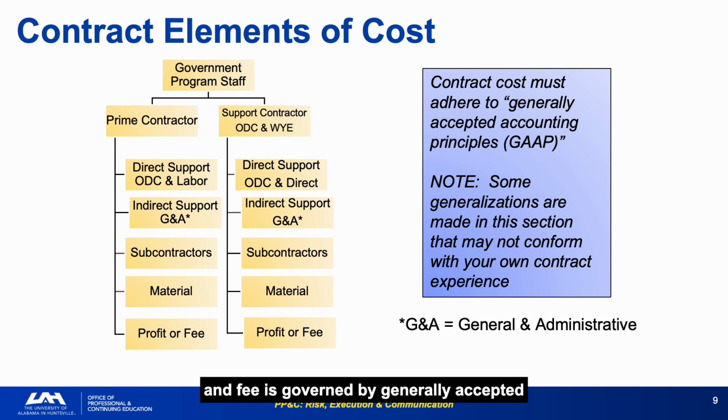governed by generally accepted accounting principles, which means the categories are consistent across virtually all major aerospace contractors. The prime contractor hierarchy shown here matters because every element at the subcontract level is also fully loaded. When you see the subcontract line on a 533, that single number contains direct labor, overhead, G&A, and fee all rolled in. GAAP compliance provides a consistent framework but not a guarantee of honest reporting. Understanding the structure is what allows you to ask the right questions when something does not add up.